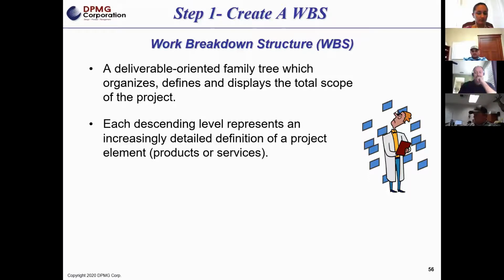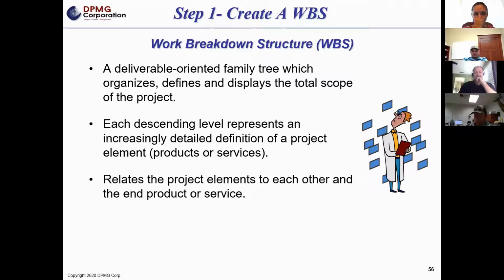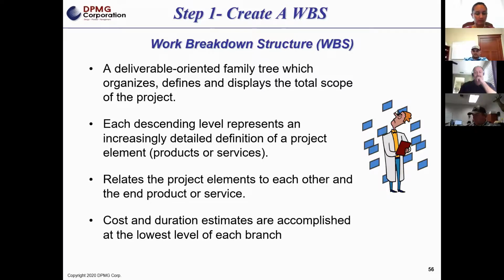Each descending level will increase in detail, regardless if we're looking at this from a product development or from a service perspective. It's also going to help you start relating elements together, whether it's a product development or a service side. And it's going to help you define, at a lower level, the cost and the duration. Cost usually is equal to effort, and we'll talk about that when we get to the time piece, and duration of how long it takes to accomplish a task or an activity or a work package.